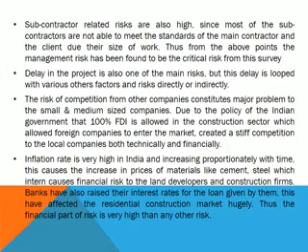Subcontractor related risks are also high, since most of the subcontractors are not able to meet the standards of the main contractor and the client due to the size of work. Thus, from the above points, the management risk has been found to be the critical risk from this survey. Delay in the project is also one of the main risks, but this delay is linked with various other factors and risks directly or indirectly.